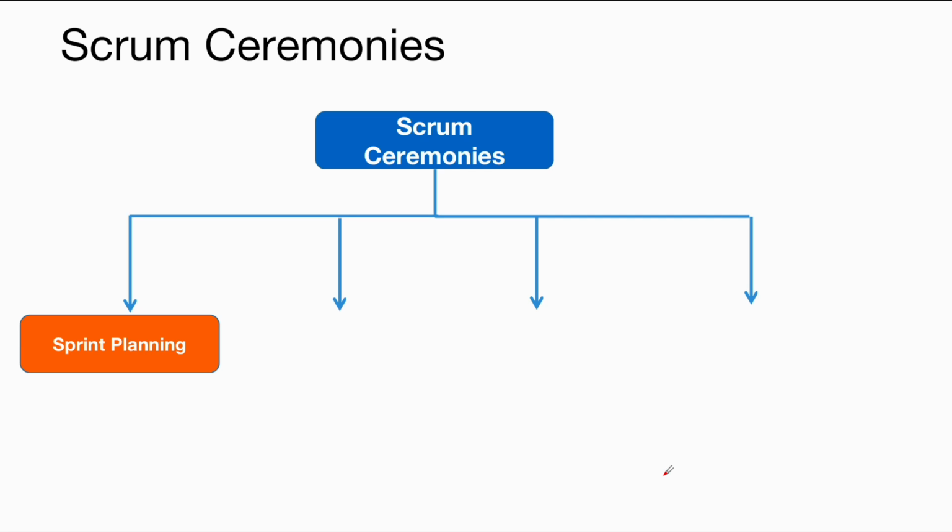One more type of ceremony or meeting is the daily stand-up. Daily stand-up means every day team members meet for a short duration of 10 to 15 minutes. They discuss what they did yesterday, what they will do today, and any problems they are facing. It is like a quick team huddle during the game to stay aligned.